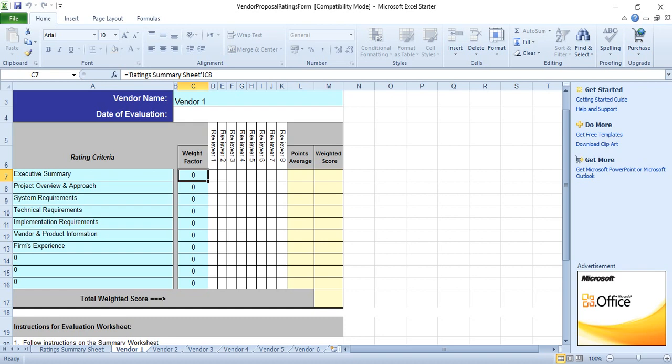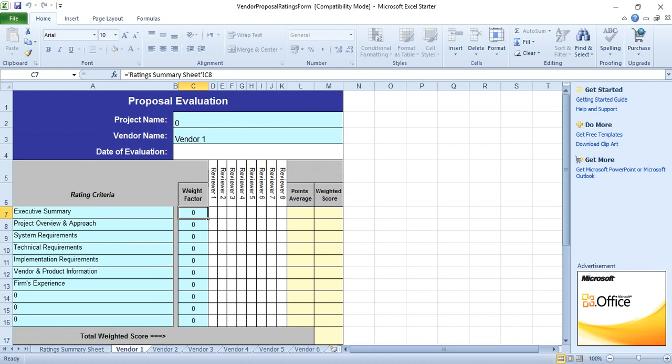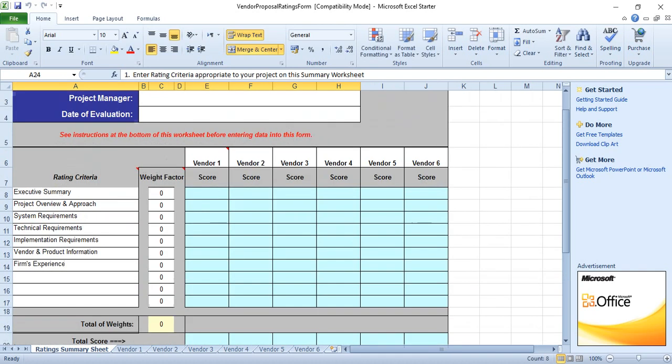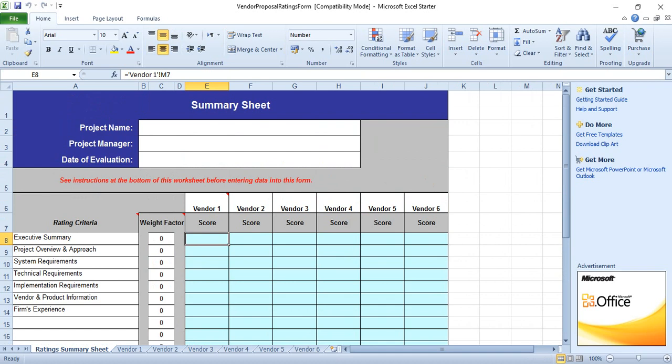and we can add a part for quality. This depends on what the team will agree about. Here's the weight, we can put a total weight score of 10. For example, for this vendor someone can give a total of 8, another 7, another 5, another 4. Then here we will collect the average. Here will be the total weight, and it will appear here for vendor number 1. This is regarding vendor proposal rating.